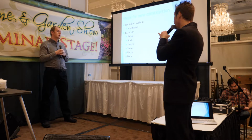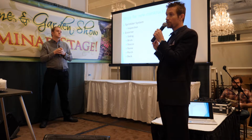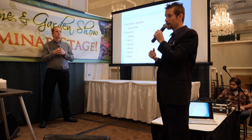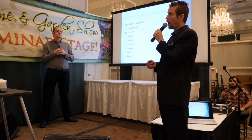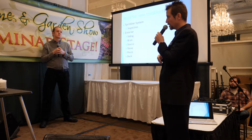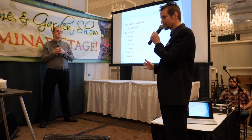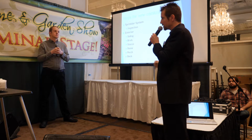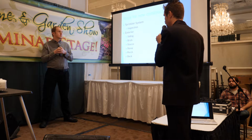Yeah, and we didn't have it in the slide, but after the sprinkler system, you're going to have your low voltage people. These are the people that are doing your speaker wire, your Cat 6. Everything is wireless today, but it's a lot quicker when you actually have Cat 6 cabling in the home. And you're going to have a much better experience with your technology with wired. And with the Cat 6 cabling, there doesn't need to be any conduit like electrical typically does. So that's why they can come in anytime. But we recommend right after the sprinkler system.